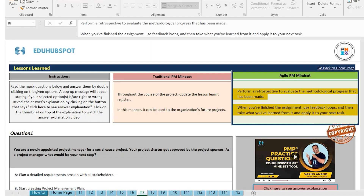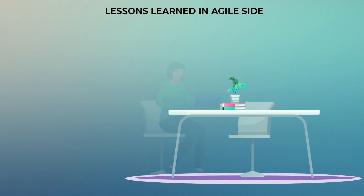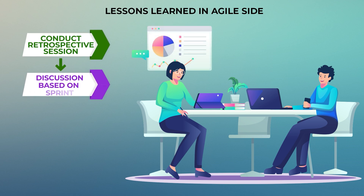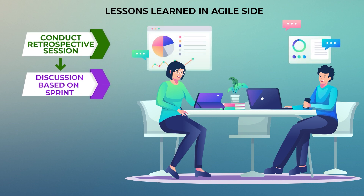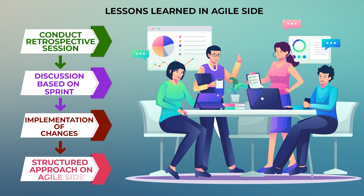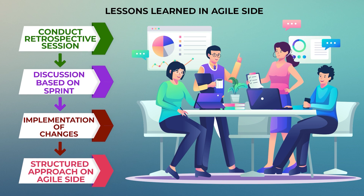On the Agile side, it's a little different. You take the feedback — for example, let's say you completed your first sprint. After the first sprint, you did a retrospective session. You talked about what things went well and what things did not go well. Based on that, you come up with certain points to implement from the next sprint. So on the Agile side, lessons learned are handled at a much more structured level compared to the traditional predictive side.